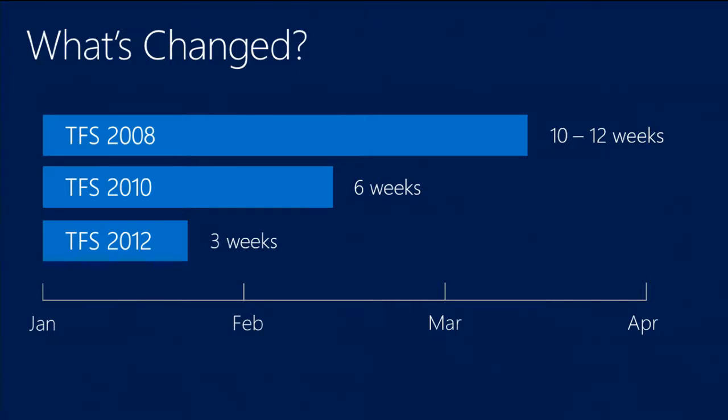Now, another interesting thing that we did a little more than a year ago is we took all the other milestones and we said, let's not have all these other weird milestones that land in the middle of sprints or randomly on the first day of a sprint. Like we'd say, let's have an offsite, and let's have it on the second day of the sprint. And the teams are just like, what are you doing to me? You're killing me. You're taking away all the leads right in the middle. And we just said, you know what? The sprint cadence rules. We're optimizing for the team. And we do everything around this 3-week cadence. So when we're planning and being thoughtful about other meetings or other activities, it all works around these 3-week sprints. And I tell you, once we did that, things got a lot better.